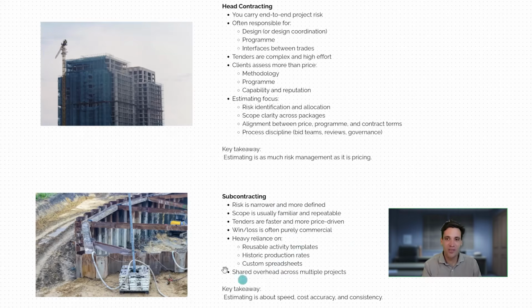Going to be getting 5 quotes and they're going to be finding the cheapest price. Therefore, the subcontractors, while the tenders are going to be less complicated and less effort, it's often much more about price. So when you're talking about the estimating process for subcontractors, it's going to be much more about having reusable activity templates, pricing the same task over and over again, maybe just adjusting the quantities for the project and the production rate for different task complexities.